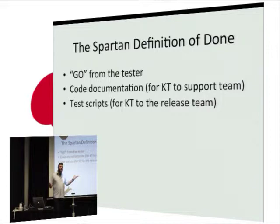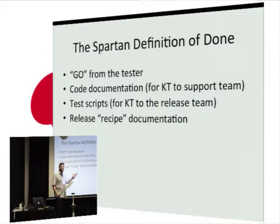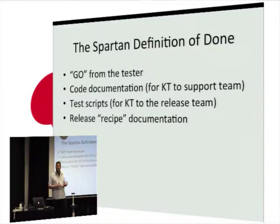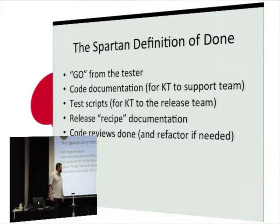Test scripts are produced by the tester in the team and are for handover to the release team, who need to repeat them in QA. The release recipe documentation is something my team added after running into problems on a previous project — we discovered there were configuration changes on servers, database scripts, and all kinds of steps we were performing that weren't documented. In Philips we've got two dev environments, QAF, QAT, staging, and then production, and you have to be able to repeat your release recipe across each stage.